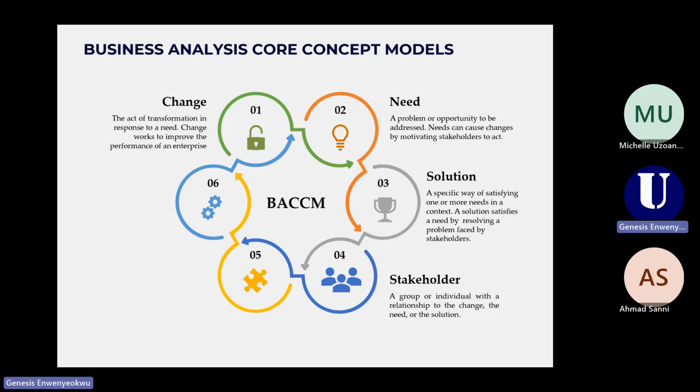So whenever you start a project, you don't need to be worried or scared trying to understand who my stakeholders are, who I will be working with in this project. All you have to ask yourself is, who are the people or persons that will be affected or that have a relationship with this change? The change is a project, or have a relationship with the need, that is a problem, or have a relationship with the solution, that is the specific ways you want to use to satisfy the need.